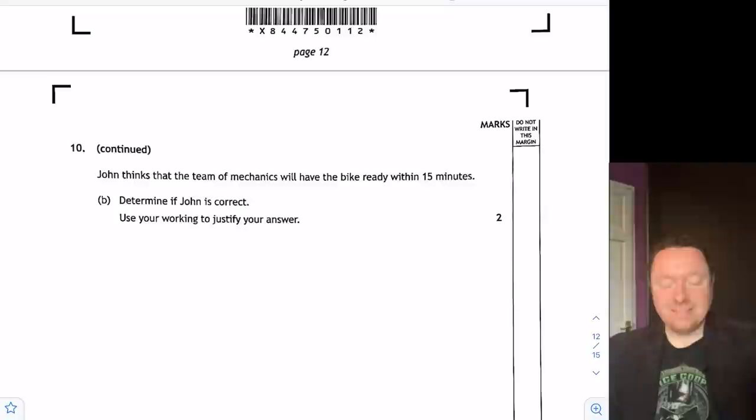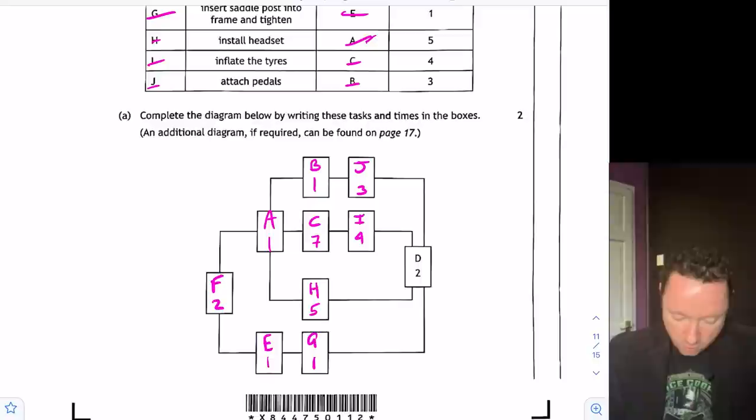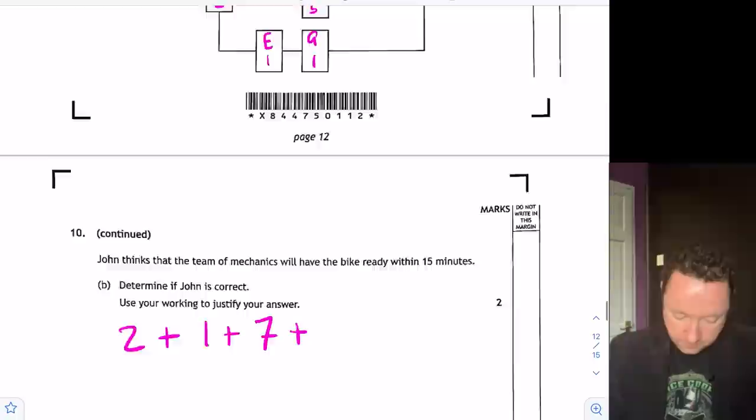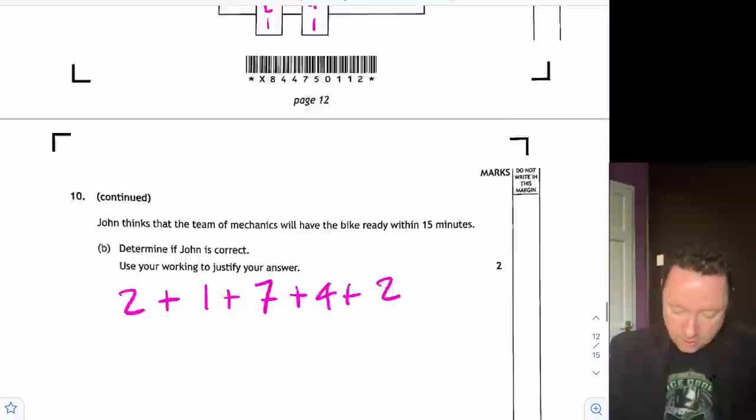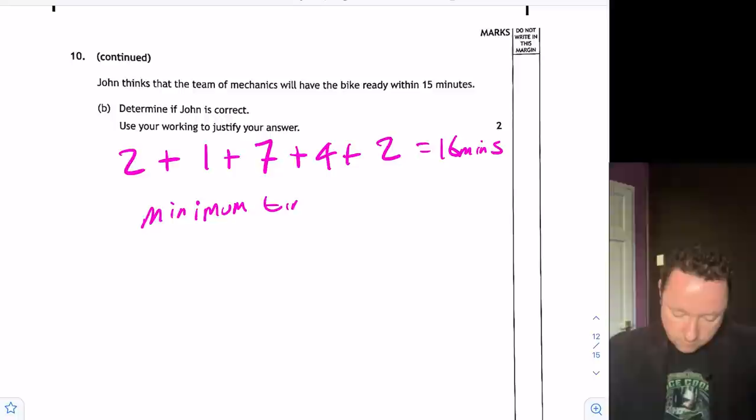John thinks the mechanics will take longer than 15 minutes. Is he correct? Well, how you do these precedence tables is you start at the start. So I've got two minutes. And then it's the longest of these two, which is one minute. So add one minute. And then when I move on, I need to wait until the longest of these is finished. So that's seven minutes. And then it's the longest of these two, that's four minutes. And then it's two minutes at the end. So that's the critical path we call that. Seven plus three is ten, two plus three is one, plus seven is ten, plus four is 14, plus two is 16 minutes is the minimum time. 16, John is wrong, since 16 is bigger than 15.